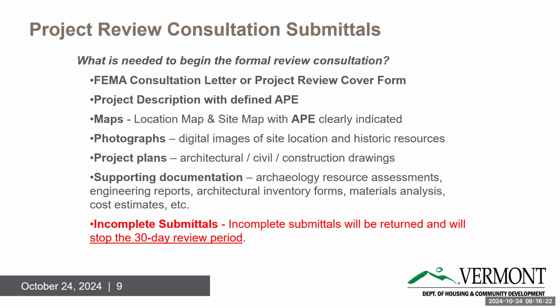And again, an incomplete submittal, we will contact you and say, we do not have all the parts, and that suspends the 30-day review or the 15-day review. If it's an emergency situation and we don't have everything, we'll immediately get on the phone and start chatting with you and figure out what to do. We don't want to hold up an emergency review just because we don't have an archaeology resource assessment yet. We might be able to do some spot assessments. We might be able to do site visits ourselves to help move things along. But otherwise, we do not want to suspend reviews.